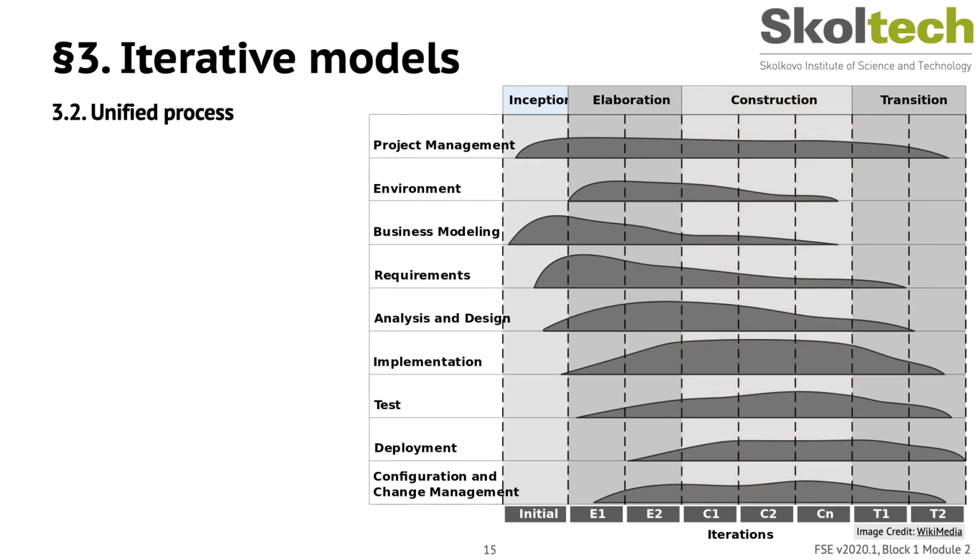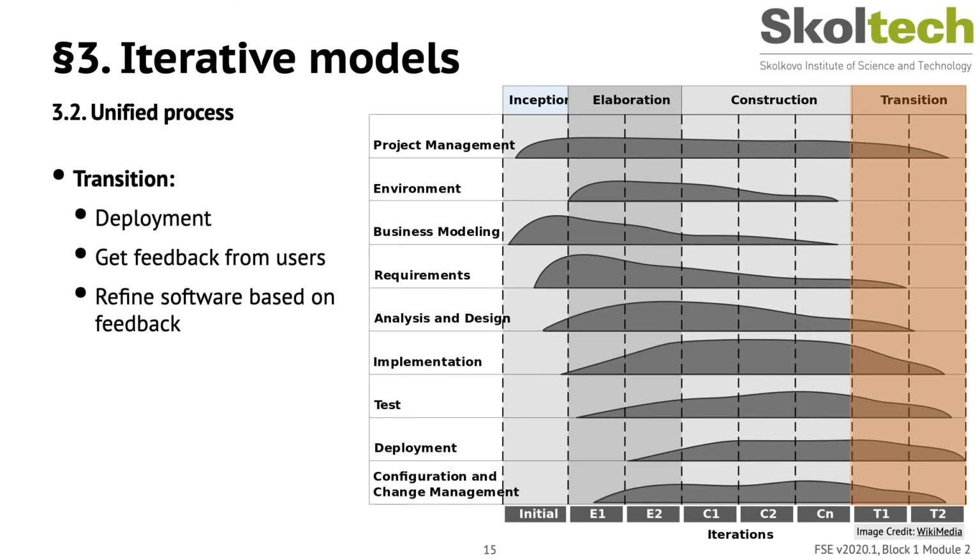During the transition phase, you transfer the project to customers and the long-term maintenance team. Based on feedback from users, you might make changes and refinements and then release a new version, so this phase can include several iterations. This phase includes all the usual transitioning tasks, such as staging, building the user environment, computers, networks or coffee machines, and so forth, user documentation, and user training.